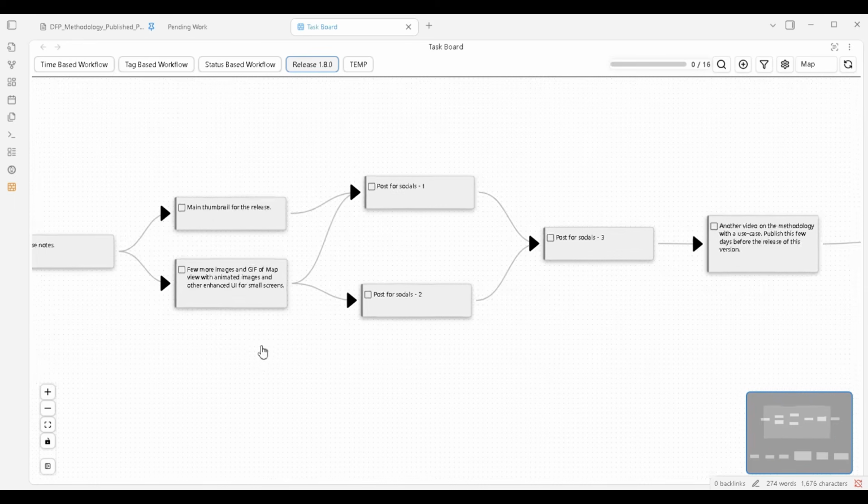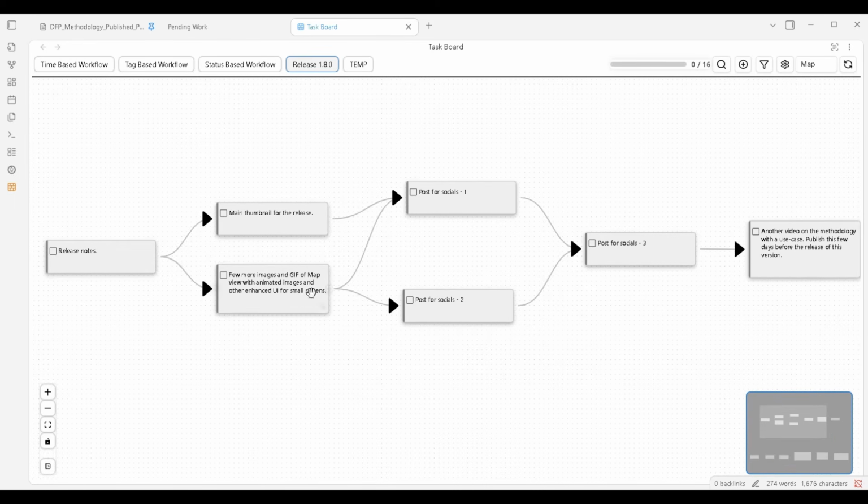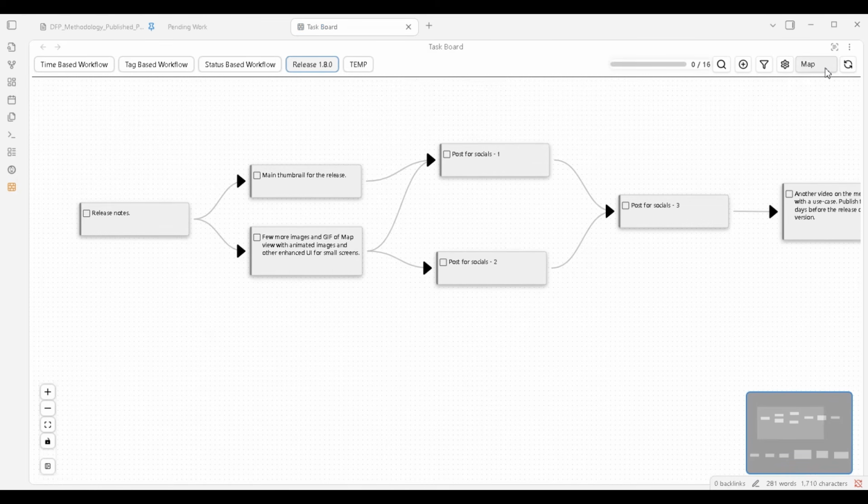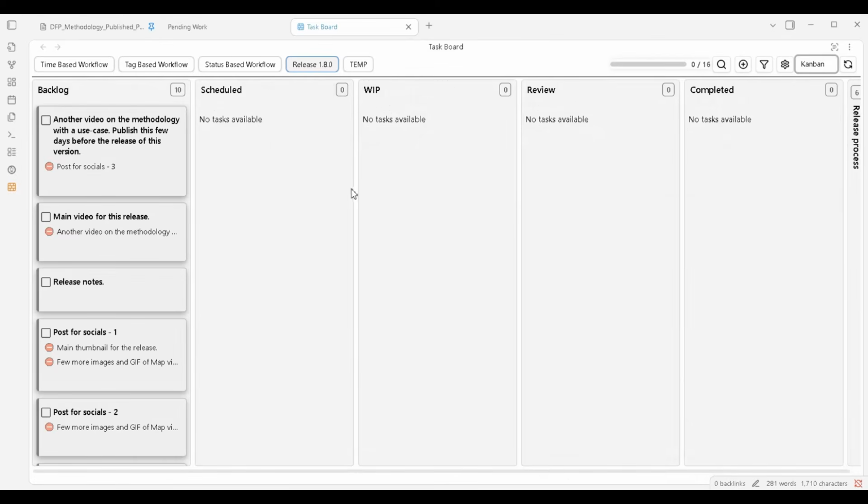And I also want to show that this tool has implemented a restriction feature, wherein, say, if I am unaware that this task was blocked by other tasks, and if I tried to mark it as complete, in say Kanban view or something, then the user will get a message that it cannot be marked as completed until I finish its child tasks, as you may see in this notice here.